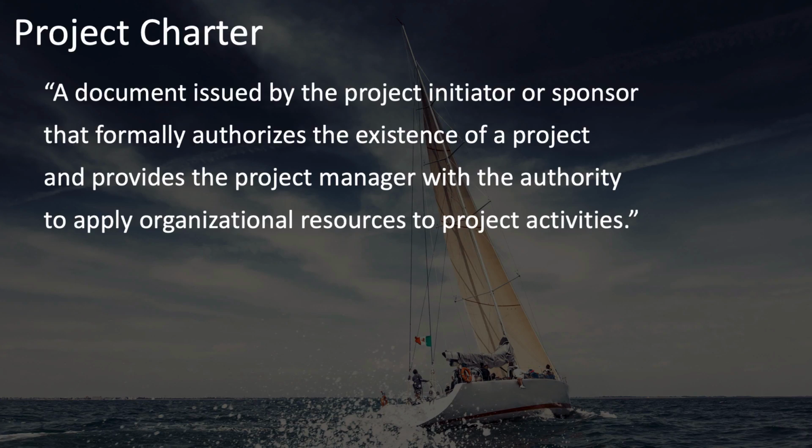The authority that's given to the project manager is to apply organizational resources to project activities. Notice that this is worded in such a way that it includes money, resources, physical facilities, team members, and so on, whatever is needed in order to get the project going. This is the type of document that you should be able to take around to the various leaders within the organization to show that the project has been authorized and to help you get the resources that you need.